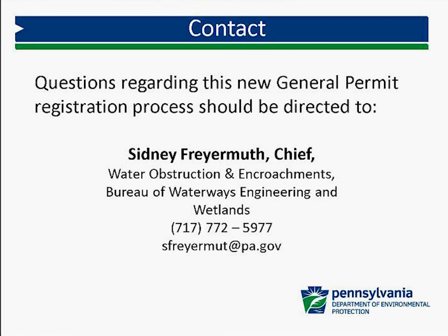Please clarify overall project purpose from Section 6. Can the project description and project purpose be included in one document, i.e. combining Sections 4 and 6? Overall project purpose, that term will be removed and it will now be project purpose. We want Sections 4 and 6 separated. For one, to describe the activity that you're proposing, and then describe the purpose of that activity separately. Part of that is to determine what your overall project is being proposed.